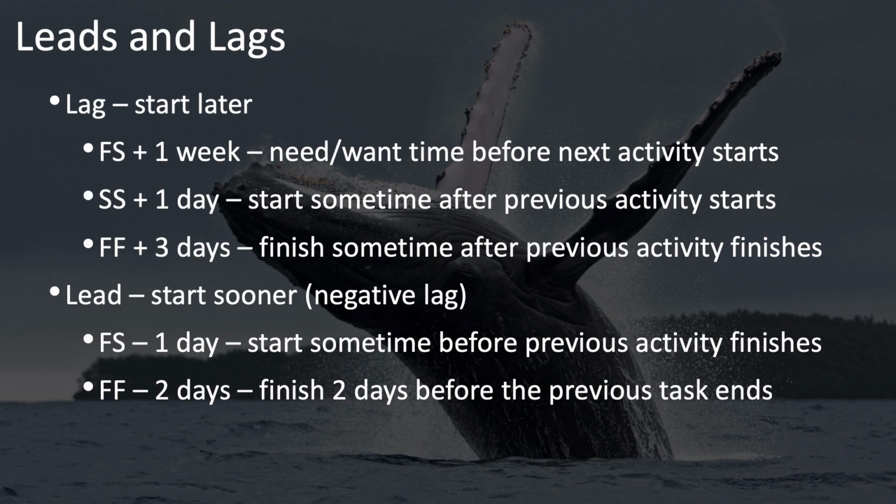Or suppose you're building a railroad and you need to lay down rail bed first, that layer of gravel foundation. Then after that, you can put down the railroad ties. And then after that, you can put down the railroad tracks. As you're building a long railway, these tasks will be happening simultaneously, but with a little bit of lag. You can start putting down the track a little bit after you've put down the railroad ties.